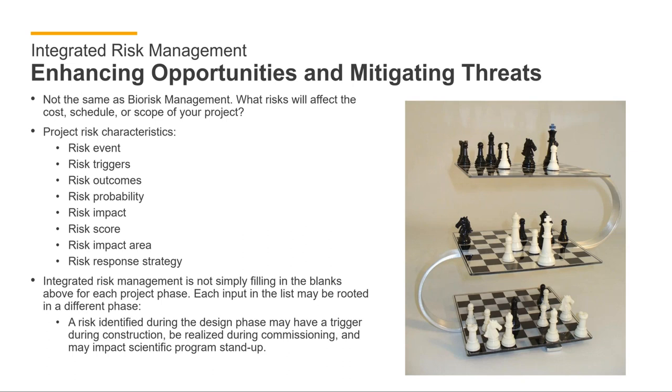So if a construction risk is moving forward or is materializing, you might have a risk response strategy that's implemented during the science program stand-up phase, or perhaps you're mitigating that risk or enhancing that opportunity during the design phase. So really, it's less about thinking about risks in a singular project phase, but really there are things you can do before or after a risk materializes, using different project phases or domains to help thwart those.